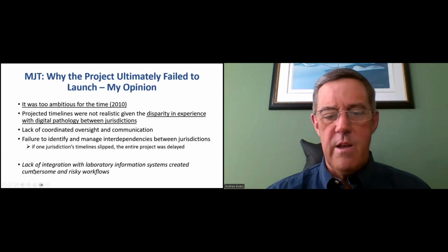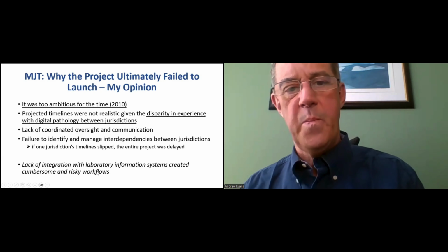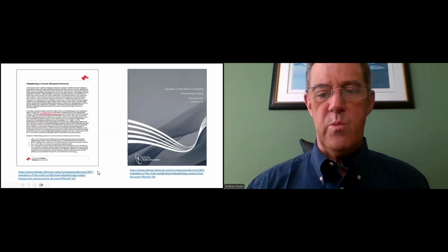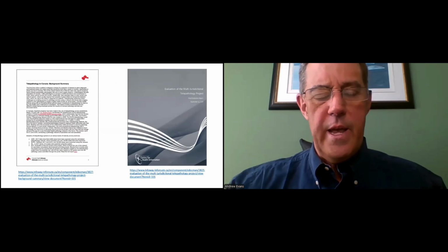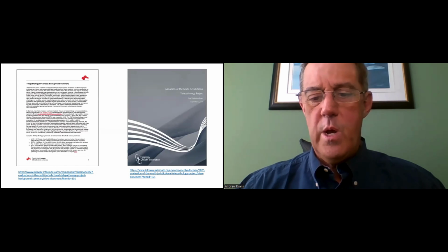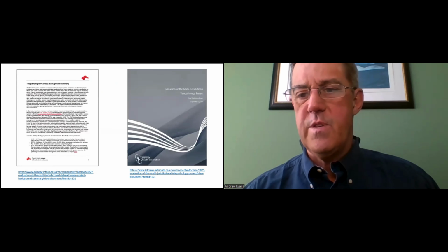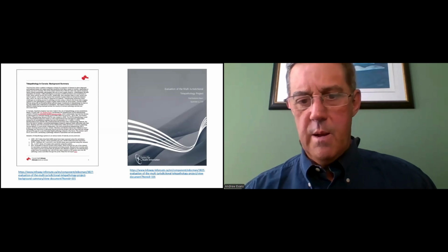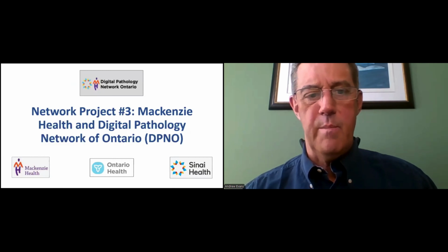Another key one is a lack of integration with lab information systems that created some cumbersome and potentially risky workflows. So you can go on. That's what I'm going to say about the MJT project from my perspective. You're able to find two documents that are available through Canada Health Infoway, and you can read objectively for yourselves and form your own opinions based on what I presented here and what you would read in those documents.